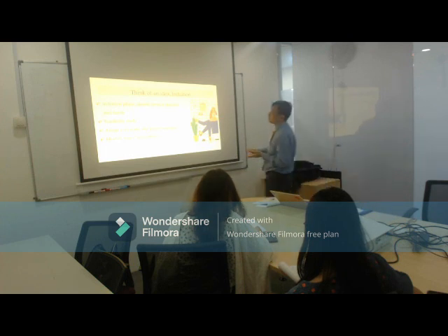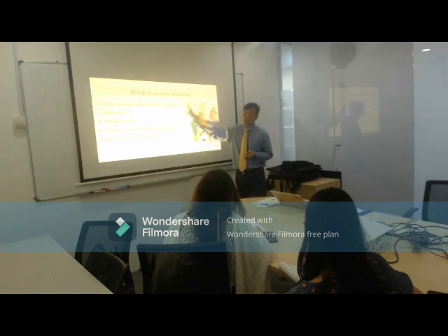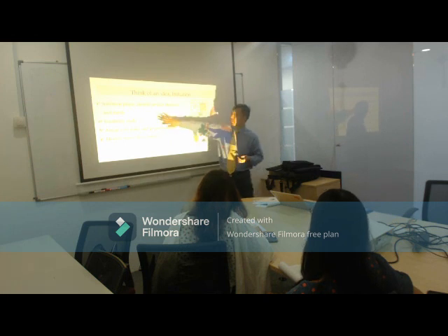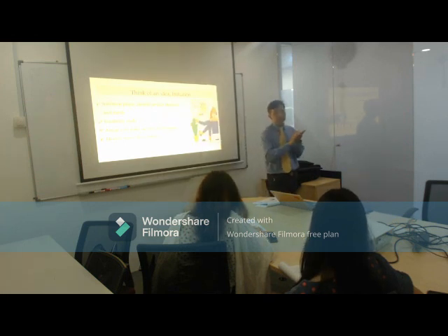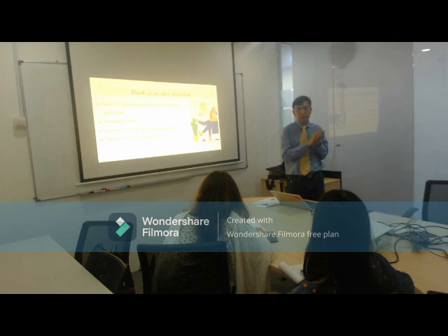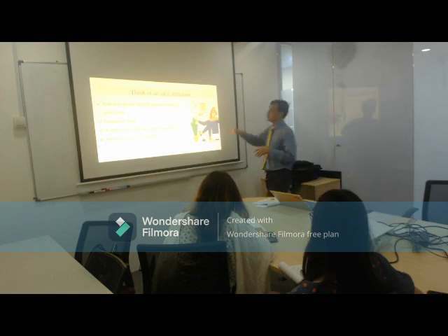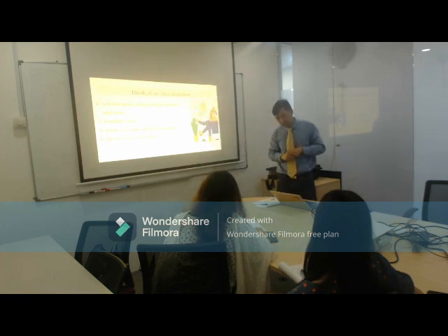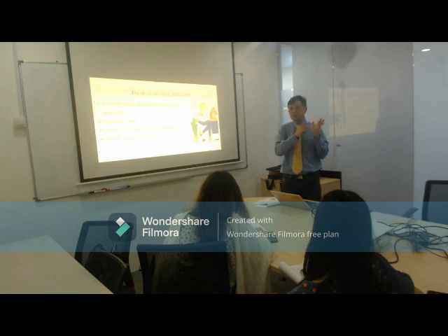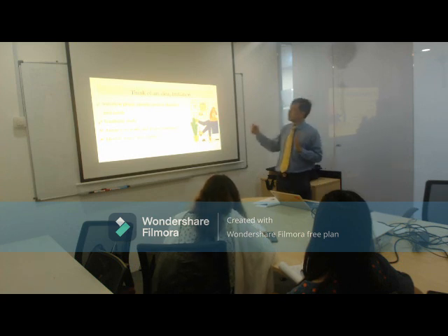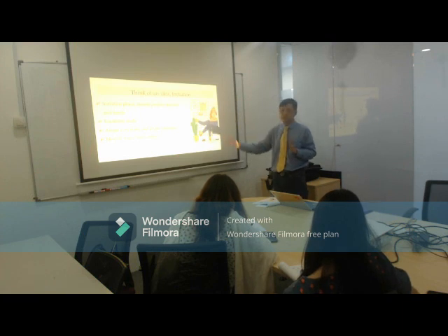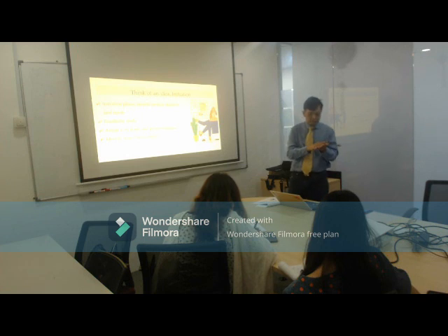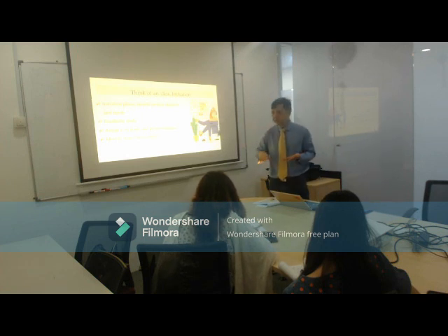And all of this requires, for companies, documentation. For example, a feasibility study: you may have to have a document to say what studies you have done, what the report is, what the cost is. Above that, you may need something called the PIN. PIN is known as Project Initiation Note. Somebody says that we want to start initiating this project. In companies, normally it's through a meeting, they agree, we have to implement a new software for our bank tellers.